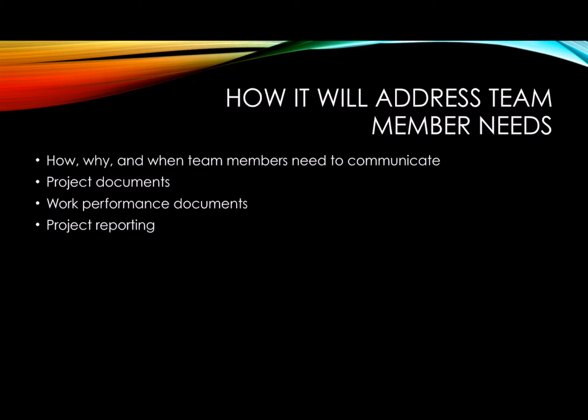It will include information on project documents relevant to the team, such as change log, issue log, lessons learned register, quality report, risk report. It will also include information on work performance reports, such as status reports and progress reports. These two reports contain information, trends, forecasts, contract performance information, risk summaries, and will create awareness and generate decision making action. This is very important in order to keep the project within the triple constraints and to deliver quality work.